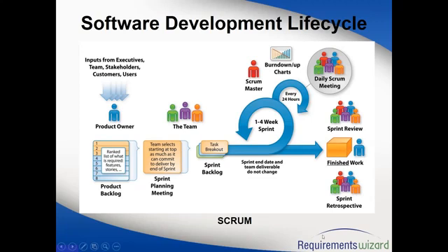That's what you do. So if you have a 2 week sprint, at the end of every second week, you will do these two meetings, your sprint review meeting and your sprint retrospective meeting.